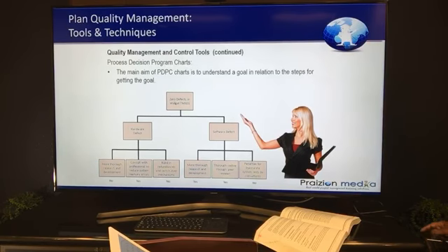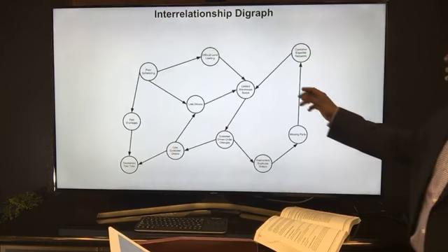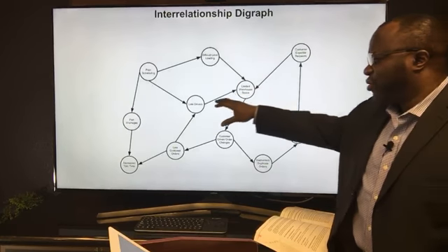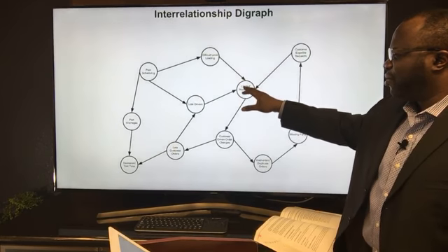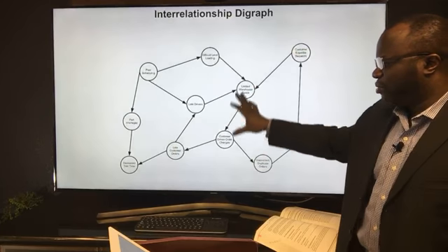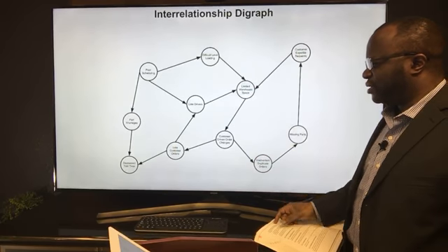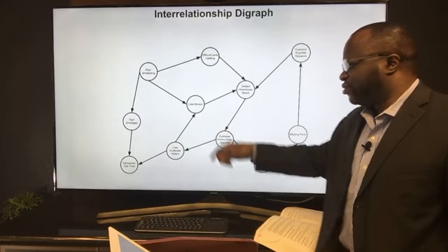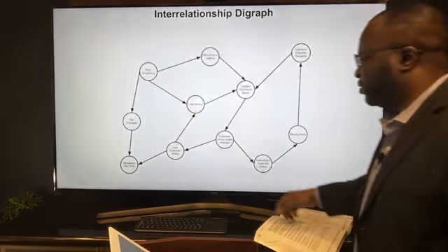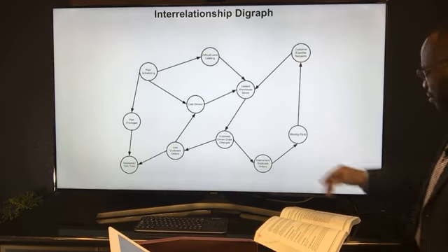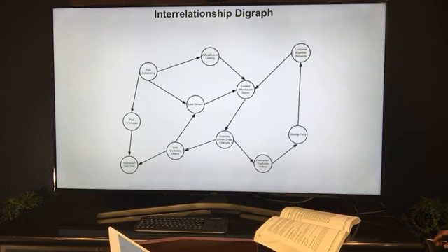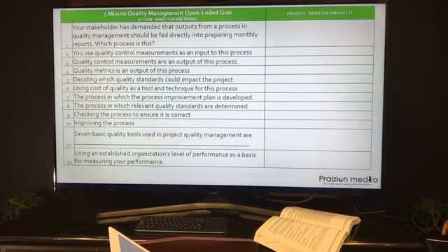And then we also talked about the interrelationship diagram. So late drivers cause limited warehouse space, difficulty level loading causes this. It shows you the web of interactivity between cause and effect. Late customer orders cause late drivers. Poor scheduling causes late drivers. Late drivers cause limited warehouse space, also caused by, so the whole web. This shows you that. What else? So let's go back to a bunch of questions and make sure we've maxed those out.